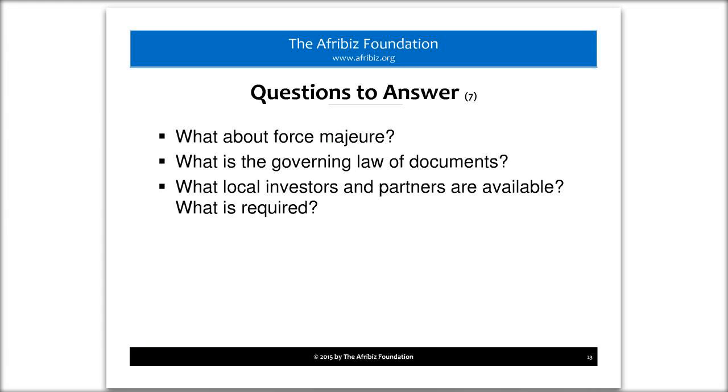In countries like Nigeria, and in fact many of these countries, there are a lot of people that have a lot of cash. And they may want to invest in some of these things because they see the long-term return on investment. So there are opportunities, particularly in the equity investment, to draw some of the capital required on these projects from local investors. Now, that doesn't mean you'll get all 30%, but if you get 10%, then you only have to find another 20%.